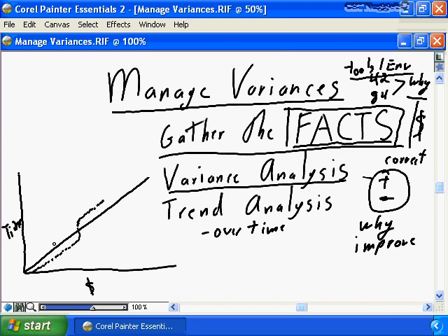But let's say that it trends upwards, and then it flattens out, and again, it's going absolutely parallel to our project baseline. What this is telling us is at the beginning of the project, we were in very much the minus situation. We were delivering our project under budget. It may mean we didn't have our full complement of team members as per the plan. It may mean we didn't bring in the supplies and materials quite as early as expected. And then all of a sudden at this point, our catch-up point, we have brought in the additional team members, we have brought in the additional supplies, and we're now very much in a plus situation.